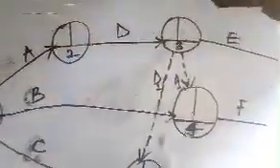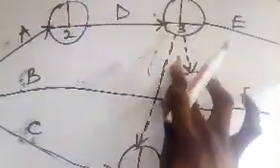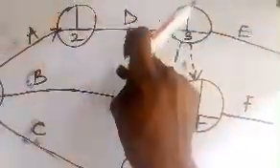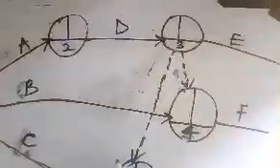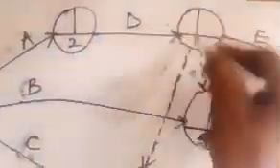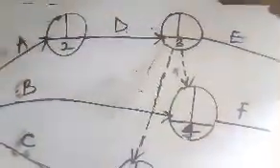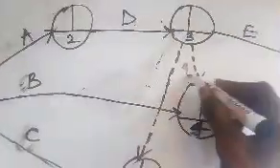What I mean by that is this same D will always be D in this real sense. So the final reason is that you can't have your activity twice in a portion. You can only have it once. So D is here. You cannot have this as D. You cannot have this as D. Do you understand? So that is that.